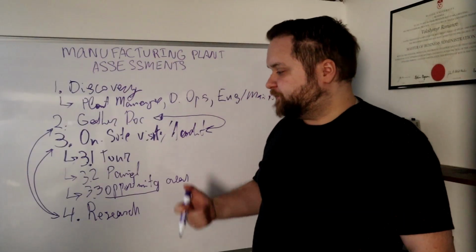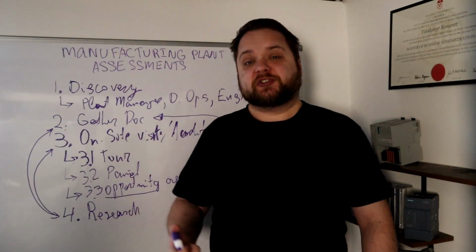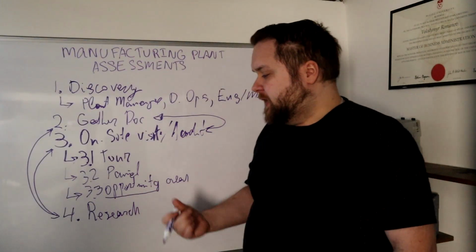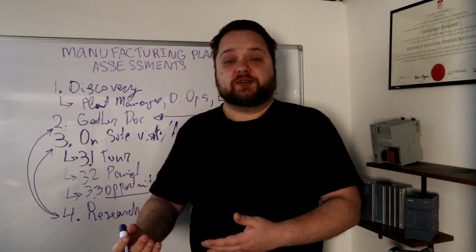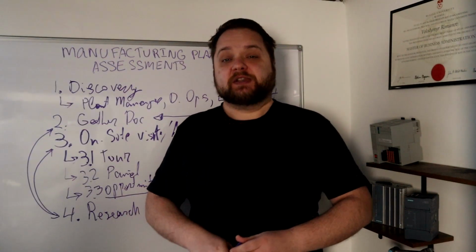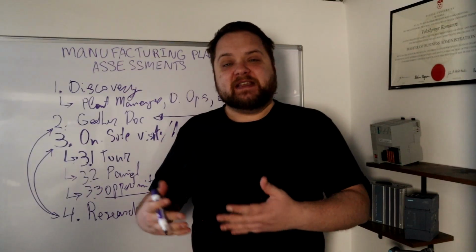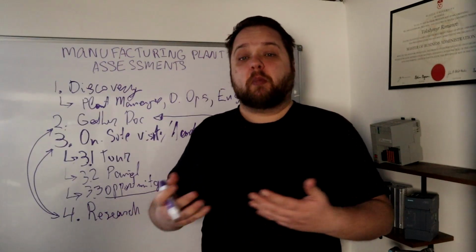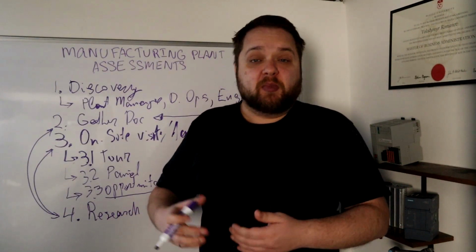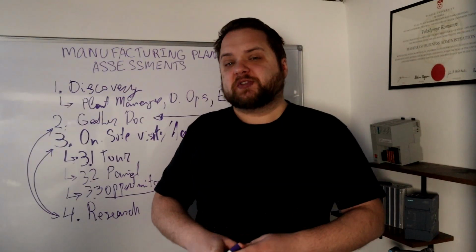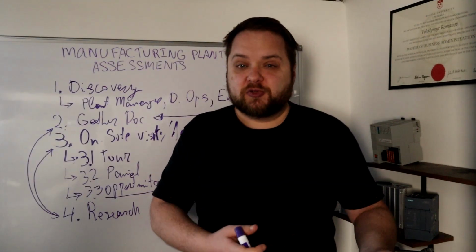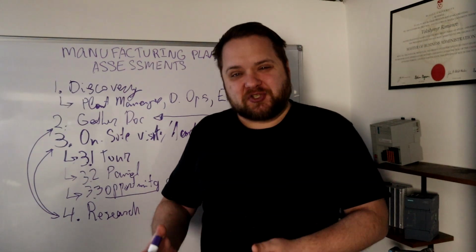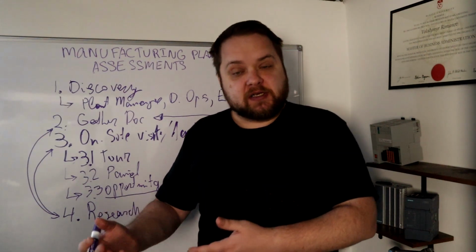It also involves asking questions on the technical side, talking to the distributor or the OEM of specific hardware. So, for example, when you show up on site and you see a lot of Allen Bradley equipment, at least in North America, it is relatively easy to find documentation and information on how obsolete or how modern some of the controllers might be. But if you're going to have smaller OEMs, so for example, very specific load cells in different industries or flow meters, they may not be as documented and might also have very custom equipment.